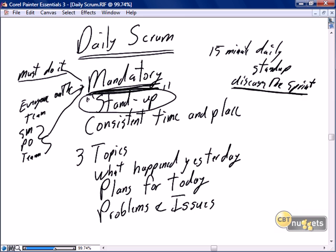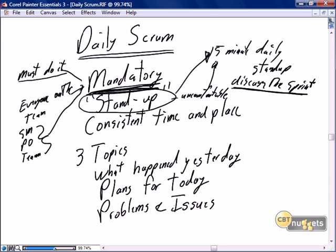The suggestion is that scrum should be a stand-up and should take no more than 15 minutes. The reason for the stand-up is that if you're standing, you're uncomfortable, you're trying to do everything to get the meeting over. By making it a stand-up, people focus on keeping it on time, saying the bare minimum to achieve the objectives of the daily scrum. Whether you do it as a stand-up or sit-down, that's not a critical element — but we want to keep people focused on the timeline and achieving the objectives.